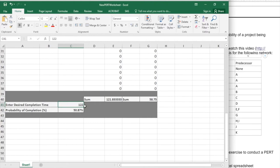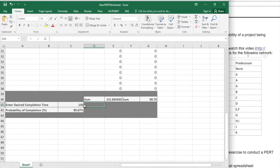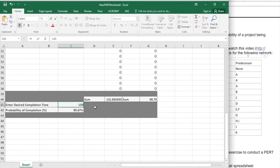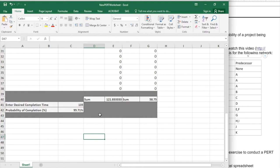So we could modify this spreadsheet so we could enter the probability that we would want to see, but we can also just come up here and enter, for example, 130 days. It tells us that would be 85% probability of being done within 130 days. And if we go to 135 days, we find that we could probably have a 95% chance of getting done based on the variability in our estimates.